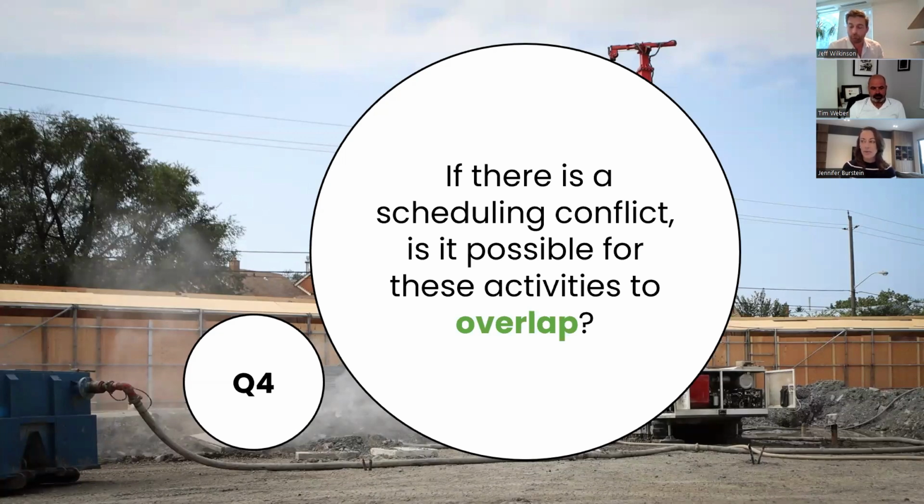The one thing we didn't talk about, which I often get questioned on, is the next stage of activities, which is the mechanical tie-ins. I've had developers ask me before, is it possible to have a different mechanical crew on site for the geothermal work that's required? And the answer is yes. It's ideal, of course, if your base building mechanical contractor does the work, but if not, I know you guys have a lot of really great relationships, Tim, and even perform some of this work in-house. Your geothermal bore field is under the ground, but your room is usually on the lowest P level, and so it is very much out of the way of your base building mechanical trade contractor.